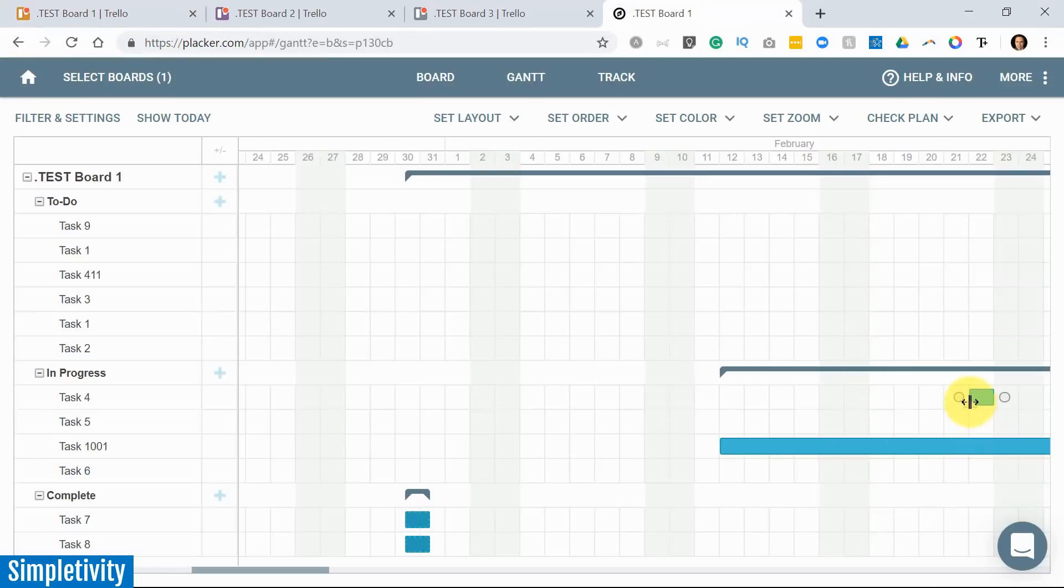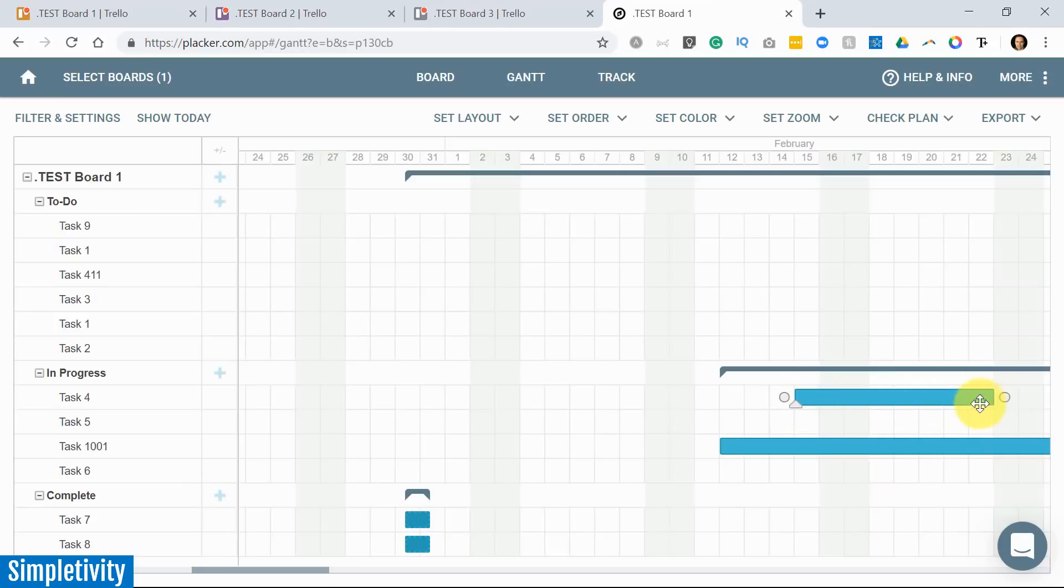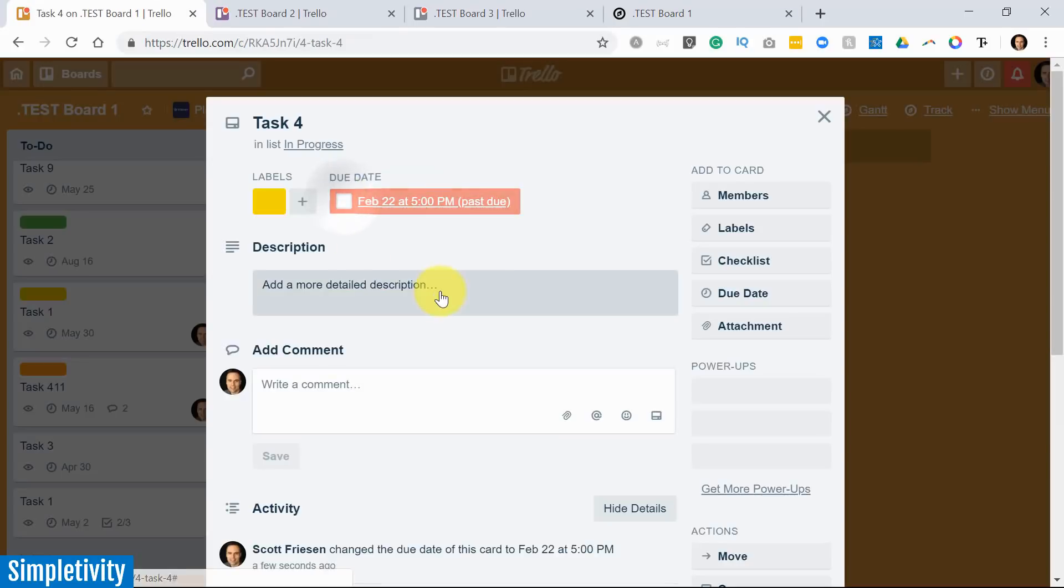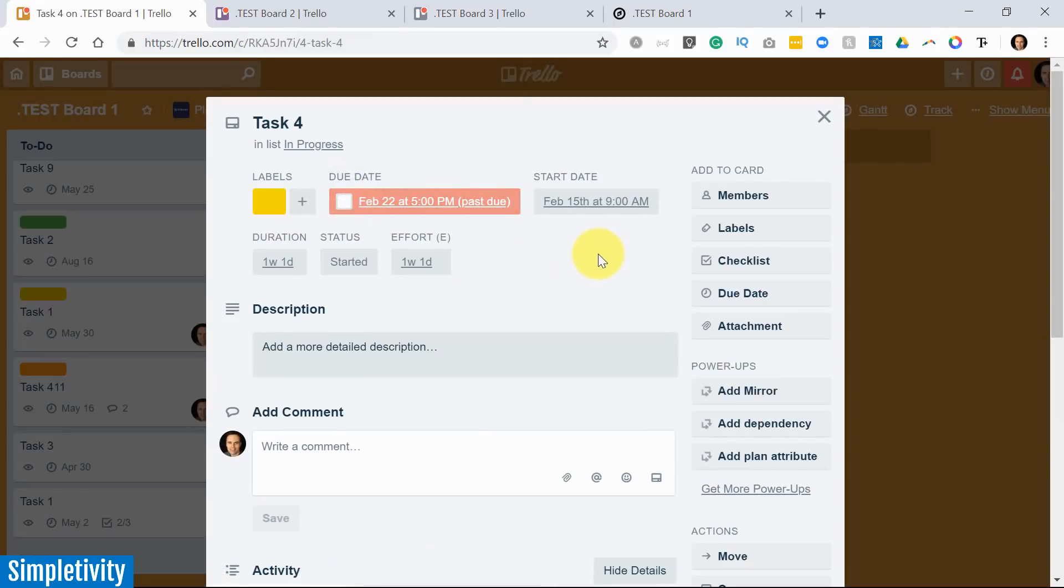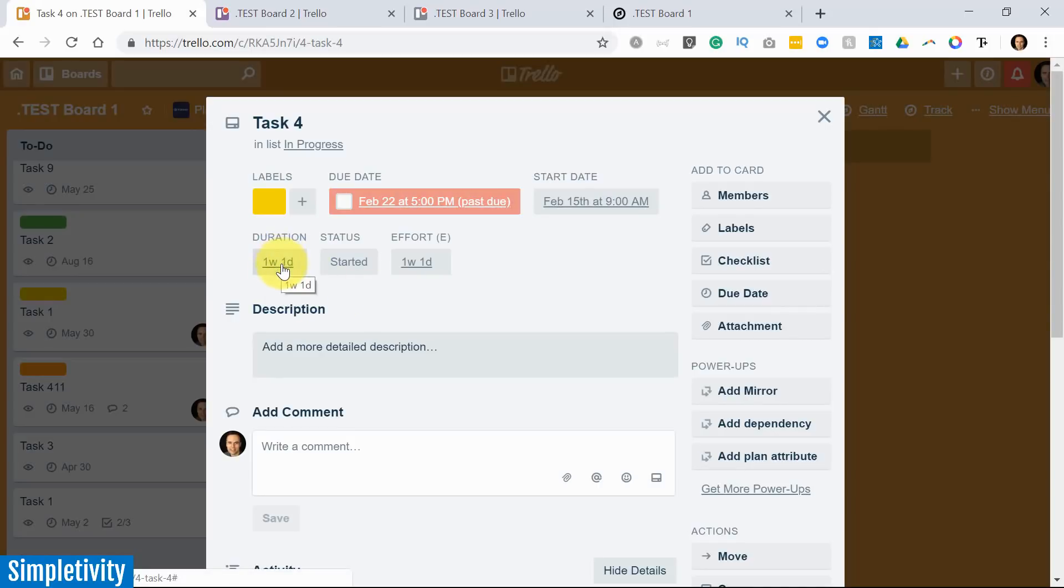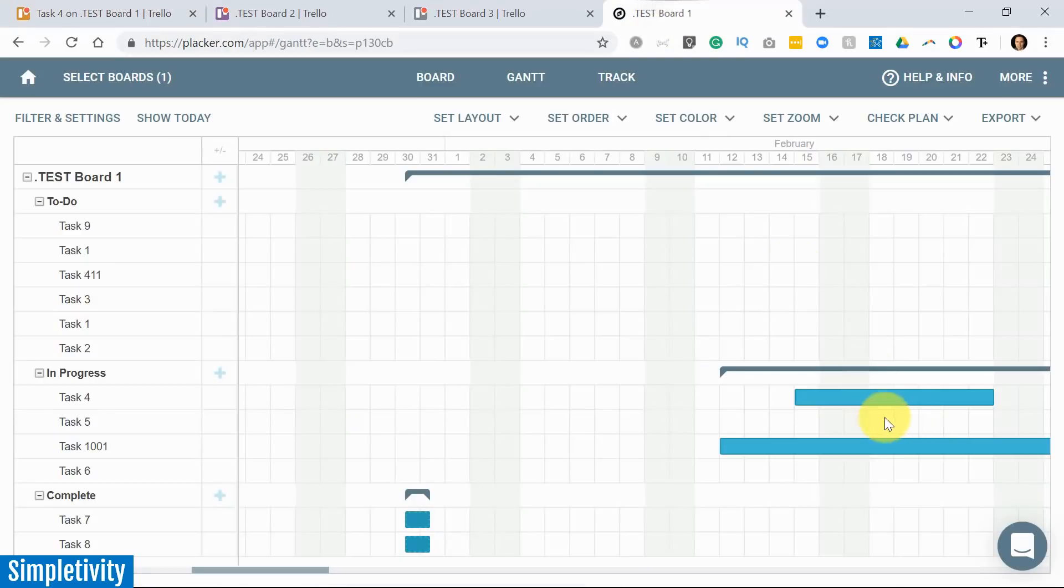Let's go one step further. And let's say, you know, it's actually going to take longer. It's going to take more than a day. Let's set a duration, because that's what a Gantt chart is all about, right? Start time and end time. Now, you're probably saying, well, you haven't changed the end time, Scott. So isn't it going to just look the same within Trello? Well, you're right. It's going to still show February 22nd as the due date here. But if I click on the card, you're going to see something special under the covers. And that is the start date is February 15th. And we still have our due date of the 22nd. It even tells me the duration one week and one day, I can edit that either here if I want to, or I can edit that here within the Placker interface. For those who are wanting start dates and end dates, Placker can do that for you as well.